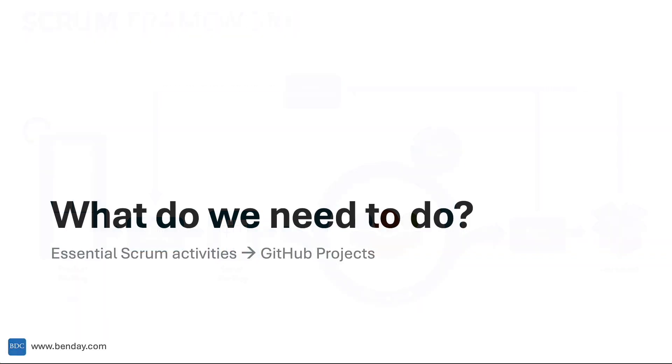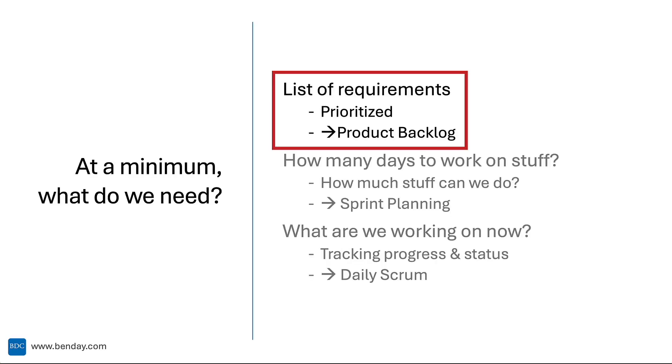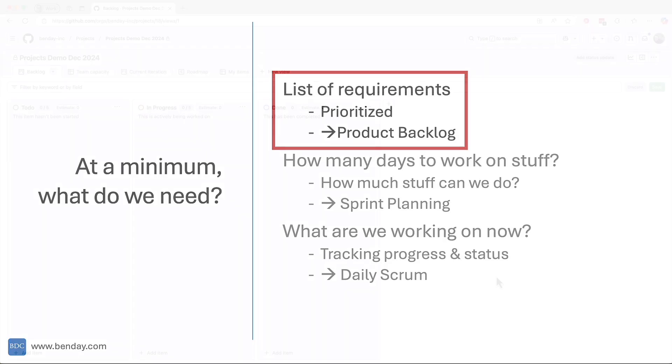Thinking about the essential activities that we're trying to map into GitHub projects, we're trying to get our list of prioritized requirements. In Scrum, this is presented by the product backlog. It's the product owner's vision for which features should be delivered and all the features that are being considered for future delivery. The items toward the top of the product backlog are the highest priority, and the items toward the bottom are the lower priority items.